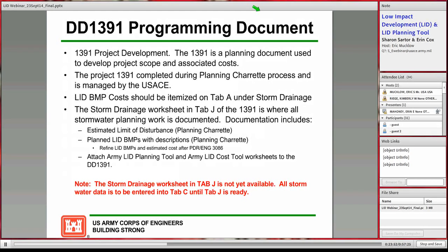For the 1391 programming document, Bill Sproul with ACSIM is working to add a worksheet on Tab J, the storm drainage section, to input details of LID BMPs selected for compliance with EISA Section 438. For right now we're going to use Tab C with a narrative that includes the estimated limit of disturbance — whether you're above 5,000 square feet — the planned LID BMPs with description, and cost estimate. As you go through the PDR and DD Form 3086 phase, you can refine the BMPs and cost. Worksheets from the planning tool and cost tool can be printed and attached.